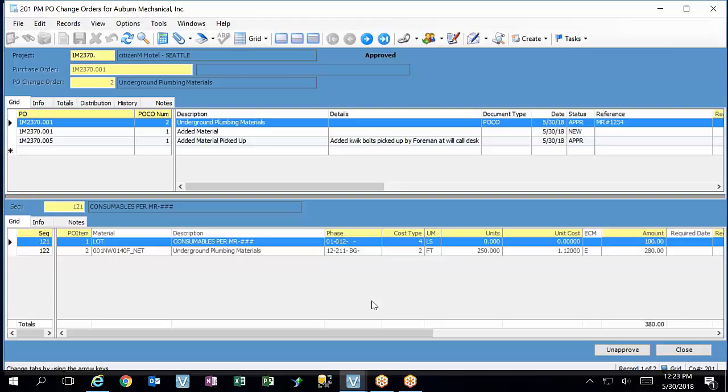What I'm thinking about here is we've now added more material that we have to pay a vendor. Back to my original example of having to add 12 heat pump units, we submit a change order for that scope. We get the cost, and it goes to a new phase code. But now we need to pay our vendor, so we write them this change order on their purchase order. But we need to allocate the funds from that phase code where we added the cost received from the owner change order. So we need to take a negative from that phase code to offset, because the budget's in the wrong phase.